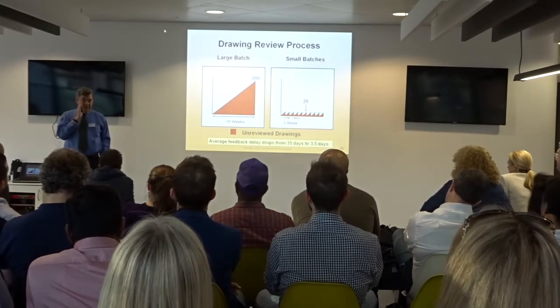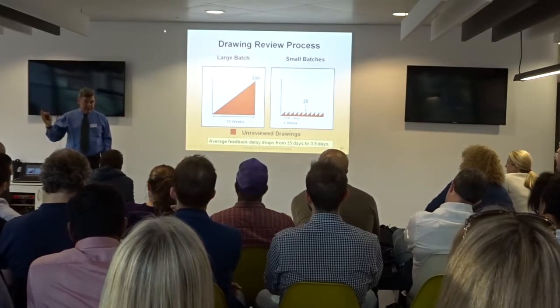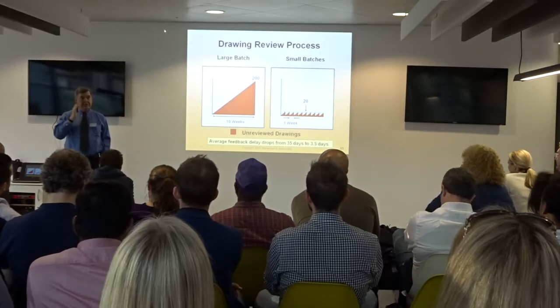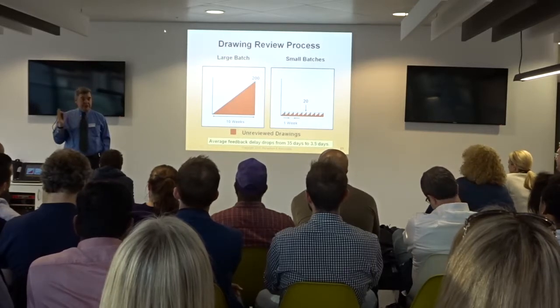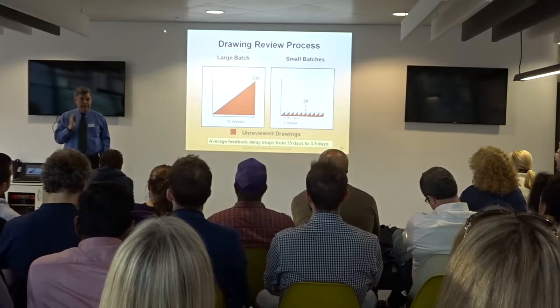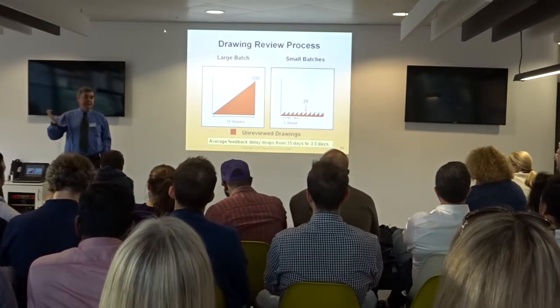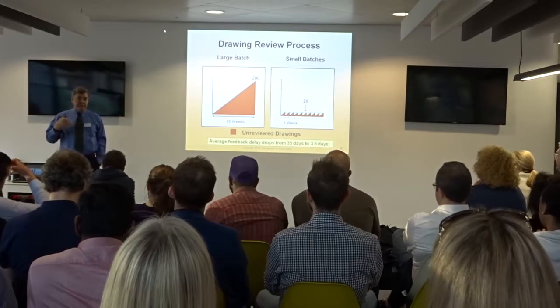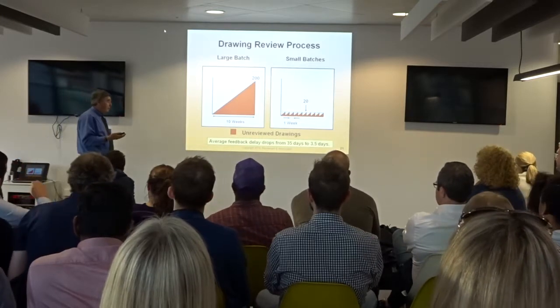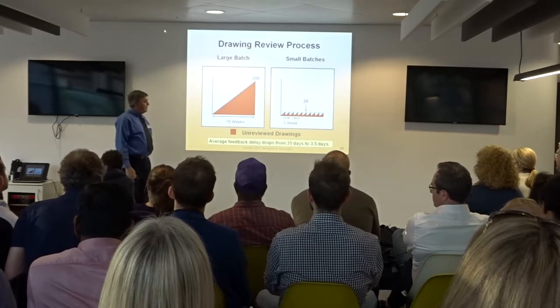Now, note that they are doing it on a regular cadence, because if you're going to have lots of meetings, you don't want to do them asynchronously on demand. You want to pre-schedule them on a cadence, just the way you do your daily stand-ups. It's the best way to avoid coordination. What's the difference between these two companies?